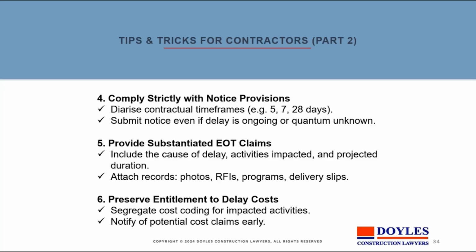The other aspect is to substantiate the claims, to make sure that you've recognised the various elements that go to make up a good claim, and you've got a logical explanation together with the records to back it up. And you've got to watch how you're incurring your costs, because unless you can segregate your costs as you go, that is, this team is working on that work and that team's working on this work, and we keep their records crisp and clear, then it's often impossible or very, very difficult to justify the costs that have been incurred.